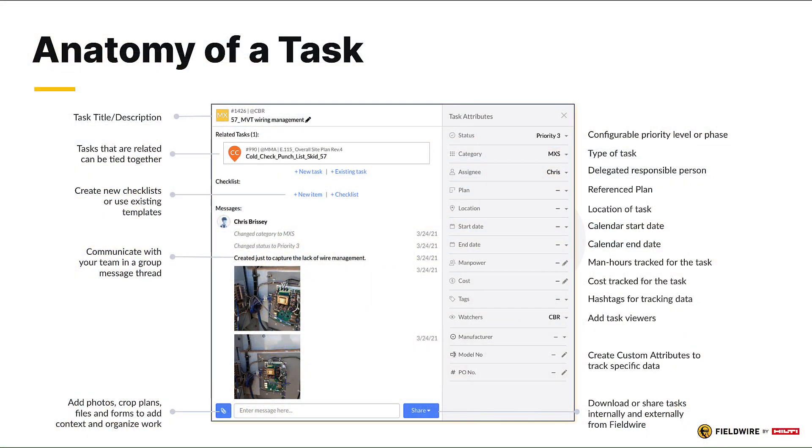You can create a task from the tasks module or directly on a plan. Both options will present you with details and attributes you can populate, such as related files and photos, duration, manpower, cost, and more.